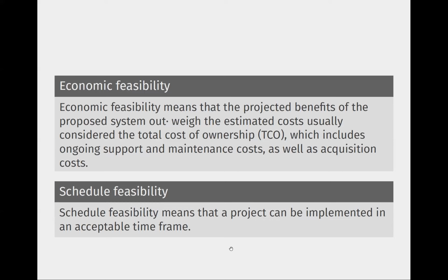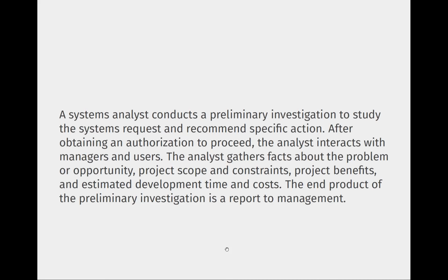Last one, schedule feasibility, right? So when you have a project, you have to have a time frame and you have to stick to it and you have to finish it. So schedule feasibility means a project can be completed in an acceptable time frame. There's no fixed hard and fast rule for this, but it's a mutual agreement between those who are going to develop the system and those who are going to use the system.